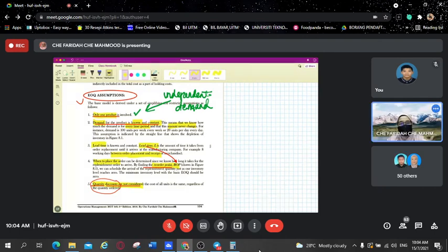Okay, let's say Pakcik orders from Adib. I call Adib today at 10, let's say on Thursday at 10. And then I ask Adib, can you deliver to me 1,000 units? From that particular time at 10 o'clock today until the day that Adib delivers to me, that is the lead time. The lead time is very important. Why? Because from there we can estimate how long it takes for Adib to supply me, and if anything happens, I can take precautions.